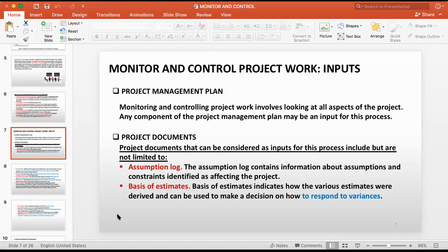But in the assumptions we put that in Kandy city, the heart of the city, in and around the lake, you will find some archaeological places. If you use machinery there, what will happen? You will break those things and damage the archaeological monuments buried in the ground.